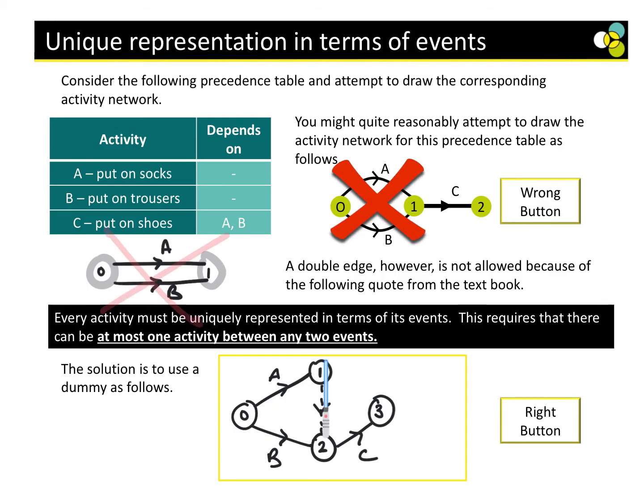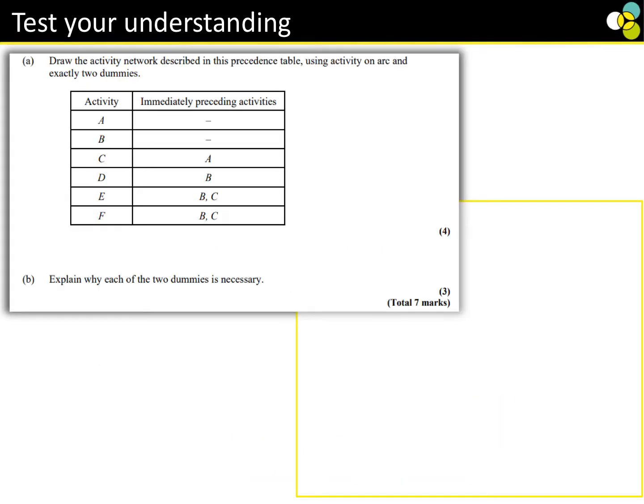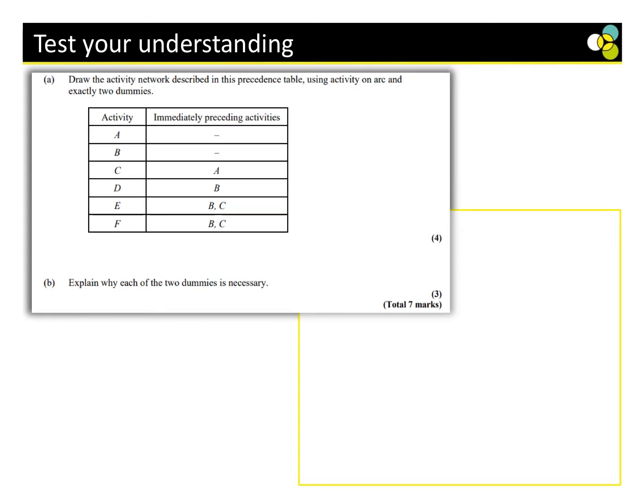Please just make sure, sometimes you have to use a dummy. You're still saying you're going to the same place. And what this dummy means is you don't have to add the weights, it's just the way you have to draw the network. Okay?